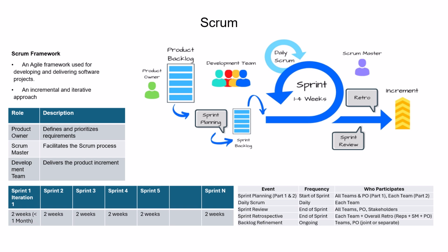Sprint is an iteration. So in Scrum, we develop software based on iterations, and an iteration is the same thing called a sprint. So sprint and iteration is the same thing here. For the sprint or iteration, it is less than a month, maximum a month actually. But what is commonly used in the industry is that the sprint is 2 weeks. So this is how it works.